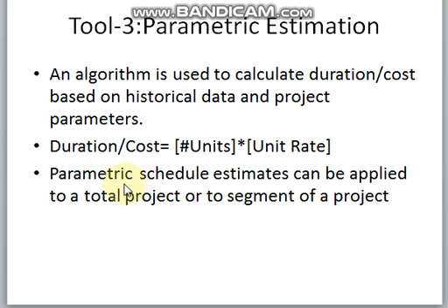So the important point here we need to know is that we can apply this parametric estimation either at the total project level or segment of project level, or we can say at the activity level. Parametric estimation provides a high level of accuracy, depending upon the accuracy built in measuring the number of units and determining the unit rate in the previous projects.